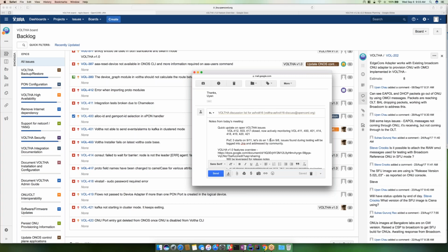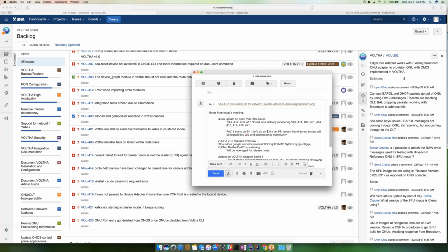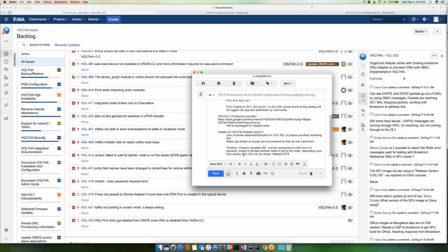So if we assume that happens, what we want is for continuing fixes to go into the 1.0 branch, so that we could probably do a 1.0.x as we move forward. The gotcha would be, the adapter release seems to move out. Initially, we were planning to not do fixes on 1.0 and just get them on 1.1 as the release, because we expect that to be pretty close behind. And then that would just roll into testing.